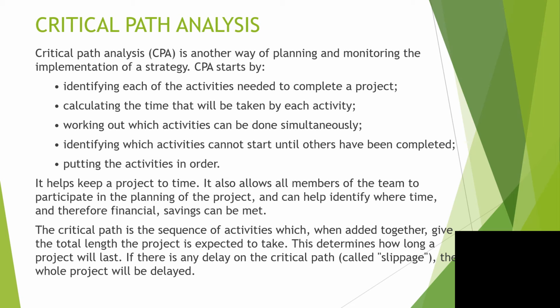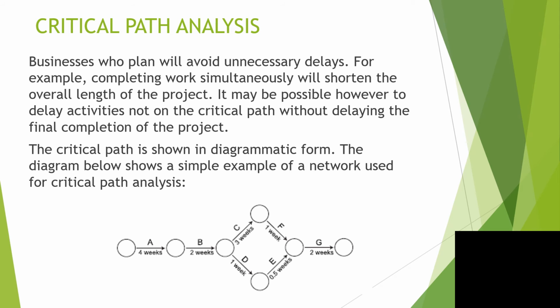If there's any delay in the critical path, we call this slippage. The whole project will be delayed, so it's important to stay as close to your times as you possibly can. Businesses who plan will avoid unnecessary delays. For example, completing work simultaneously will shorten the overall length of the project. So I gave you the example of rewiring and replumbing a house at the same time.